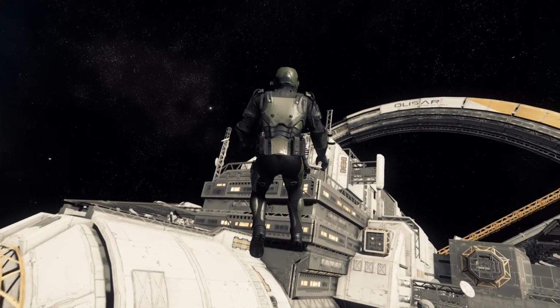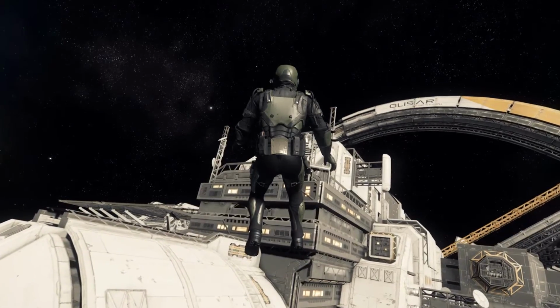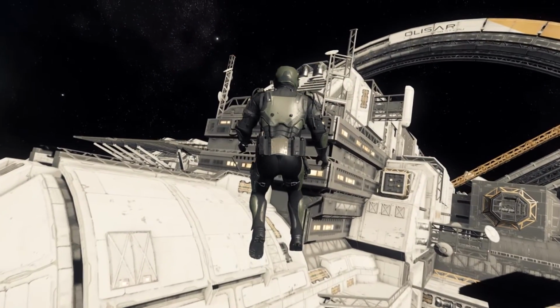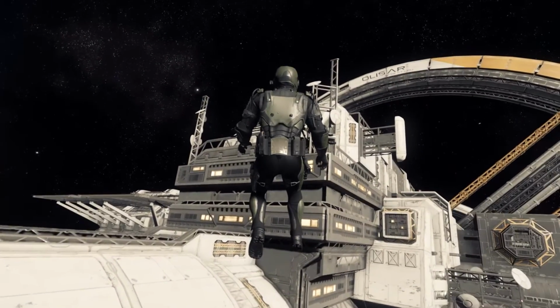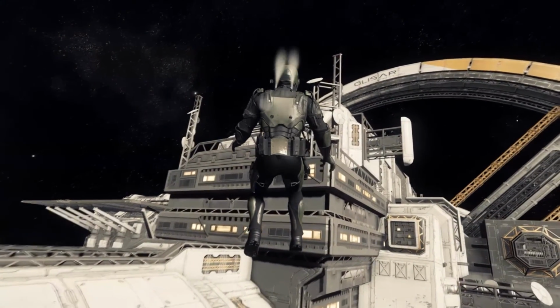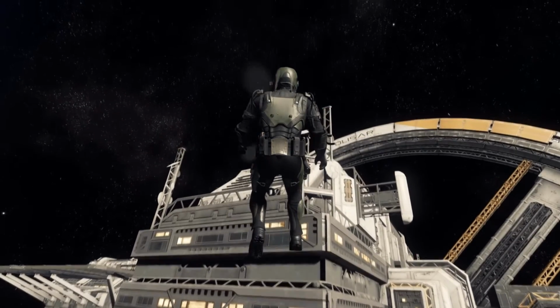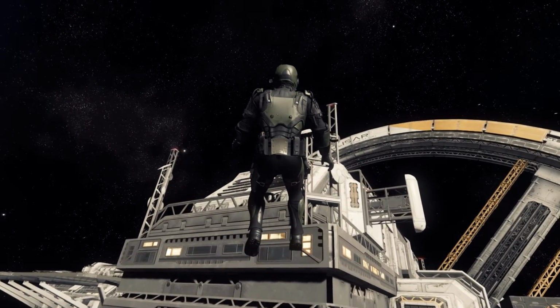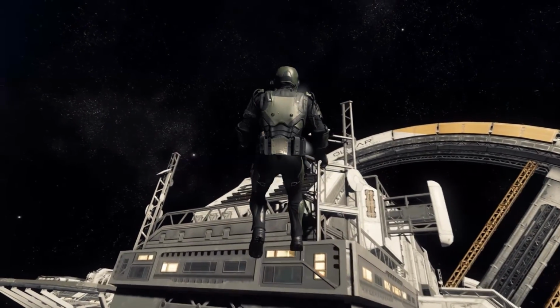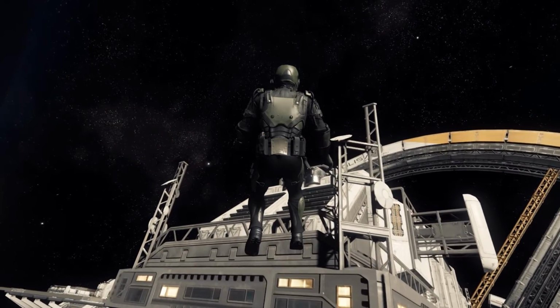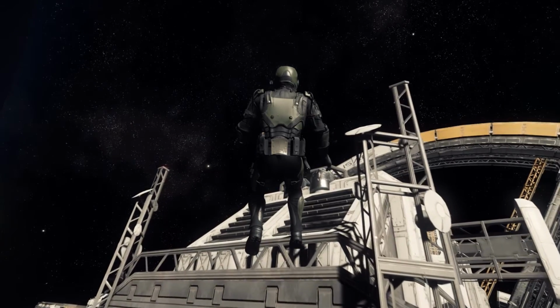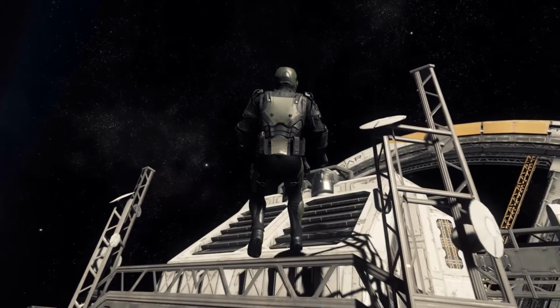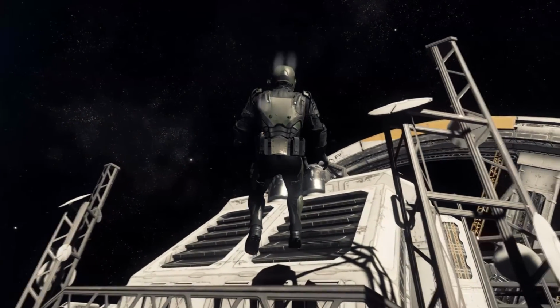Maybe if Big Benny's Noodles had 2 employees, one employee can prepare the noodles while another prepares the sauce. Maybe the sauce can be prepared ahead of time. Maybe you can have water already boiling. The point is that the more activities and buffers you can move from the critical path to a non-critical path, the better your flow time, your actual flow time, will be.